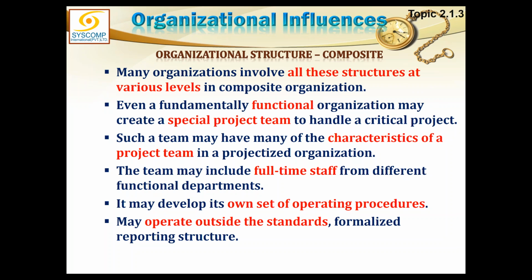When the project is finishing, the project manager is more worried about his men rather than the project. Where will they go if the project finishes? What will happen to these people? So he starts thinking on those lines and facilitating them, thus sometimes damaging the project, elongating it unnecessarily just to accommodate people for a little longer, or maybe providing them opportunities for getting hired elsewhere while being on the project list. These things are not allowed.